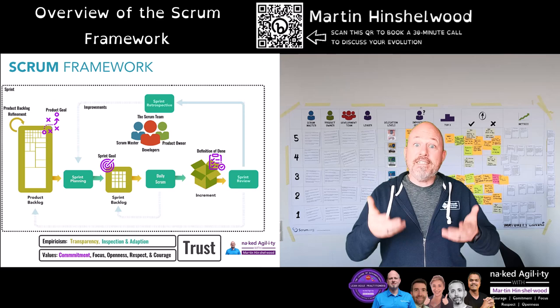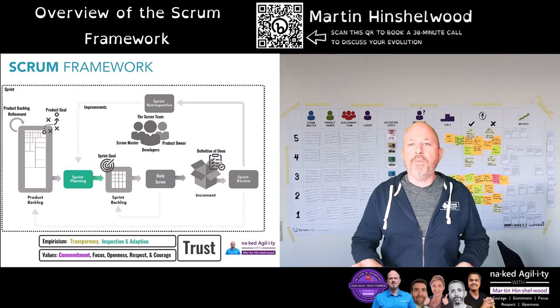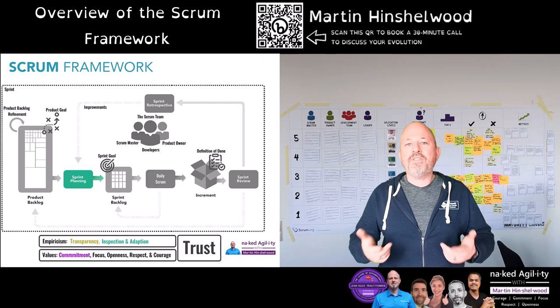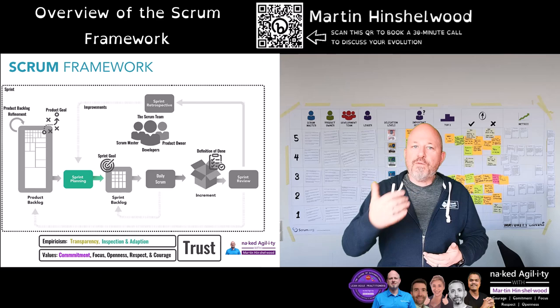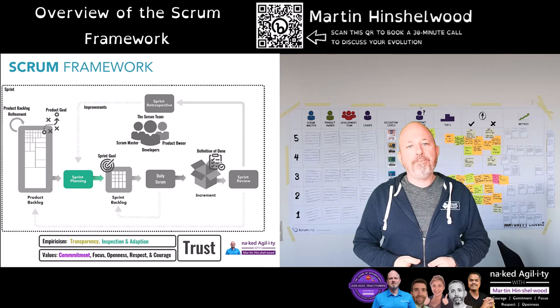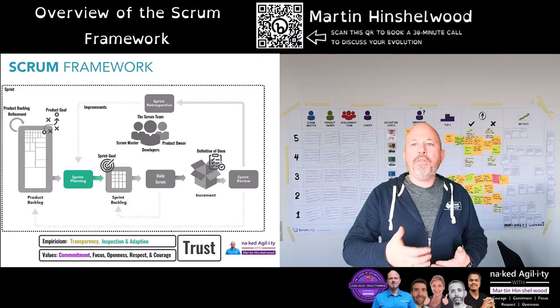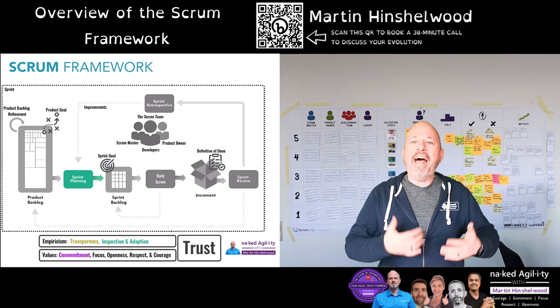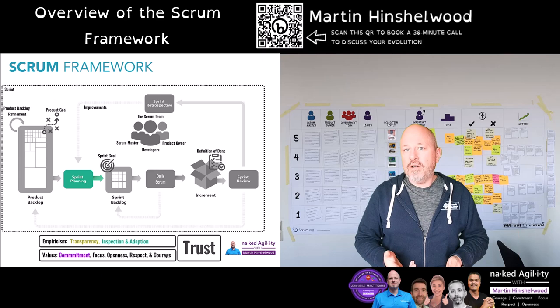The first event in Scrum is sprint planning. This event is where the Scrum team inspects the product backlog and adapts the sprint backlog — its purpose is to plan the sprint. Focus for the upcoming sprint is created with the sprint goal formulated by the Scrum team. The developers then select items from the product backlog that best enable them to work towards this goal, while considering the order of the product backlog and the needs of the product. These choices may also trigger a change in the sprint goal.